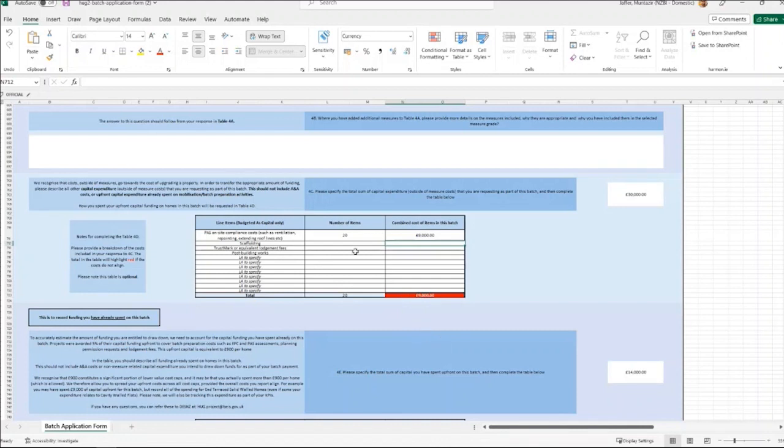We know that your Trustmark lodgement fees again will need to lodge every property, and again they will cost £1,000. And we know that we want to do some enabling works at this point in time for the solid wall properties. And those will cost a further £20,000.